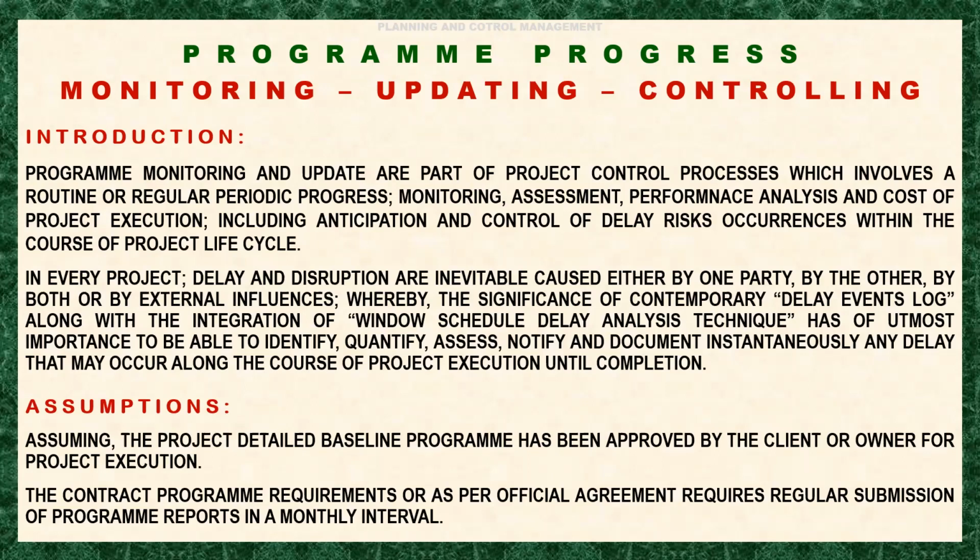Sometimes during the kick-off meeting, after the notice of award or after the notice to proceed, there should always be a kick-off meeting where the project should be discussed for everything, and that includes the program requirements, or let's say the agreement on the interval of the submission of the progress of the project.